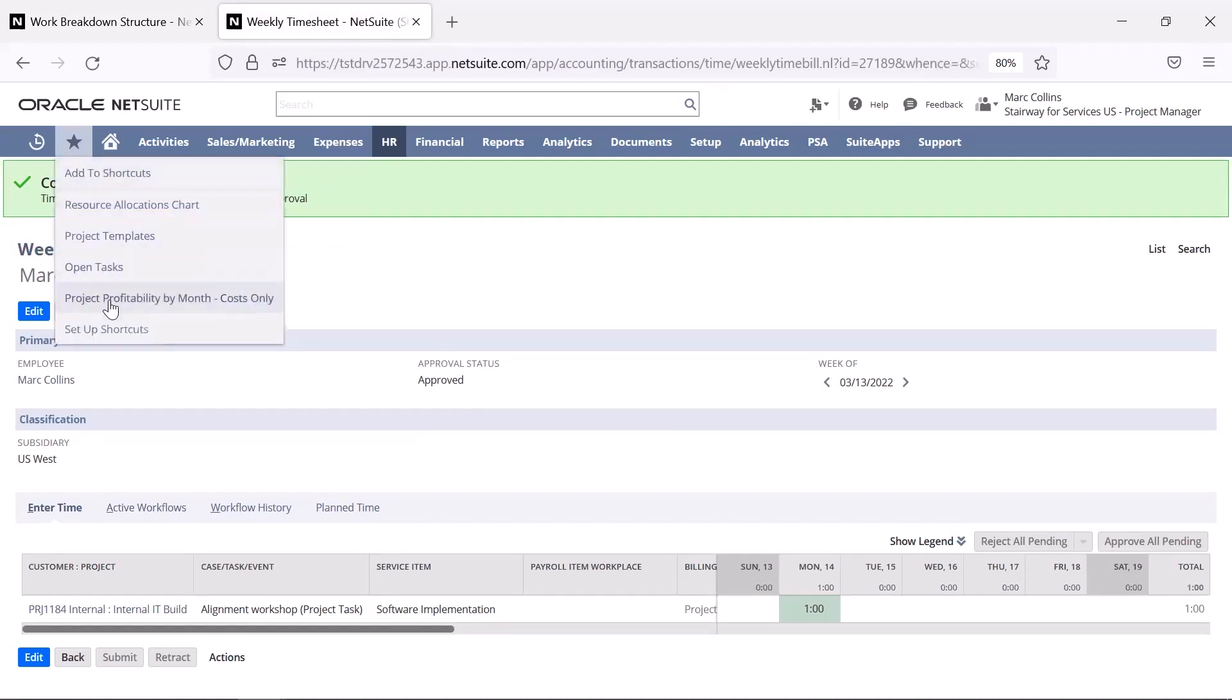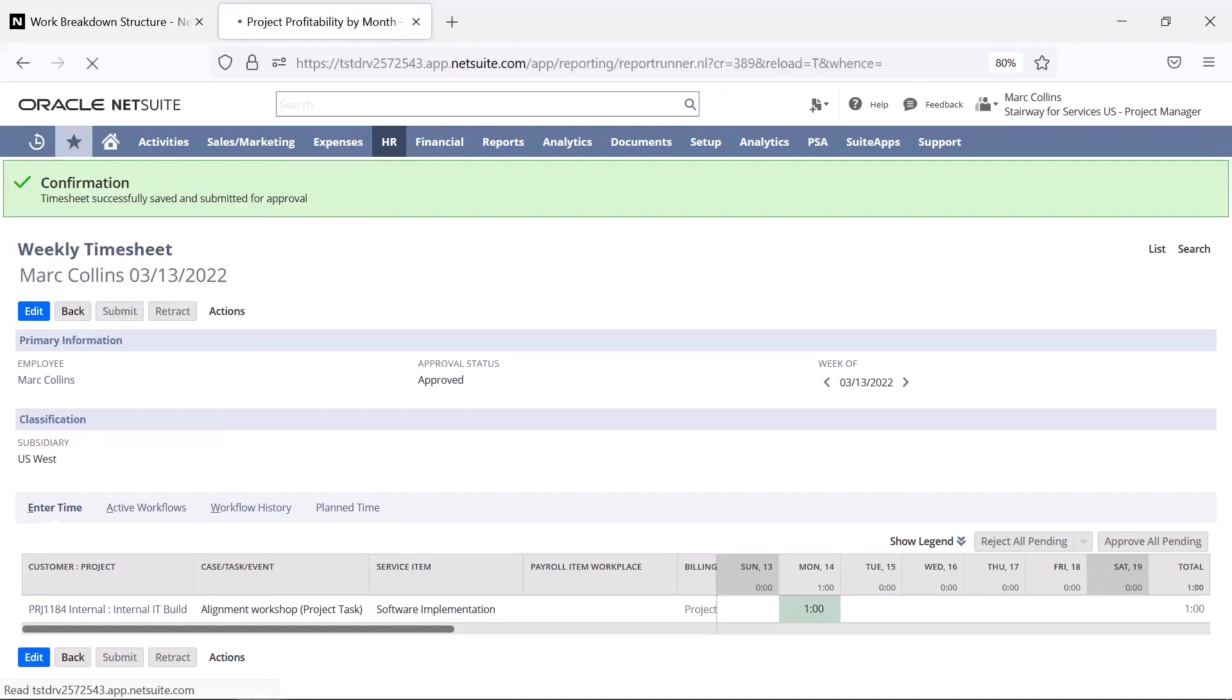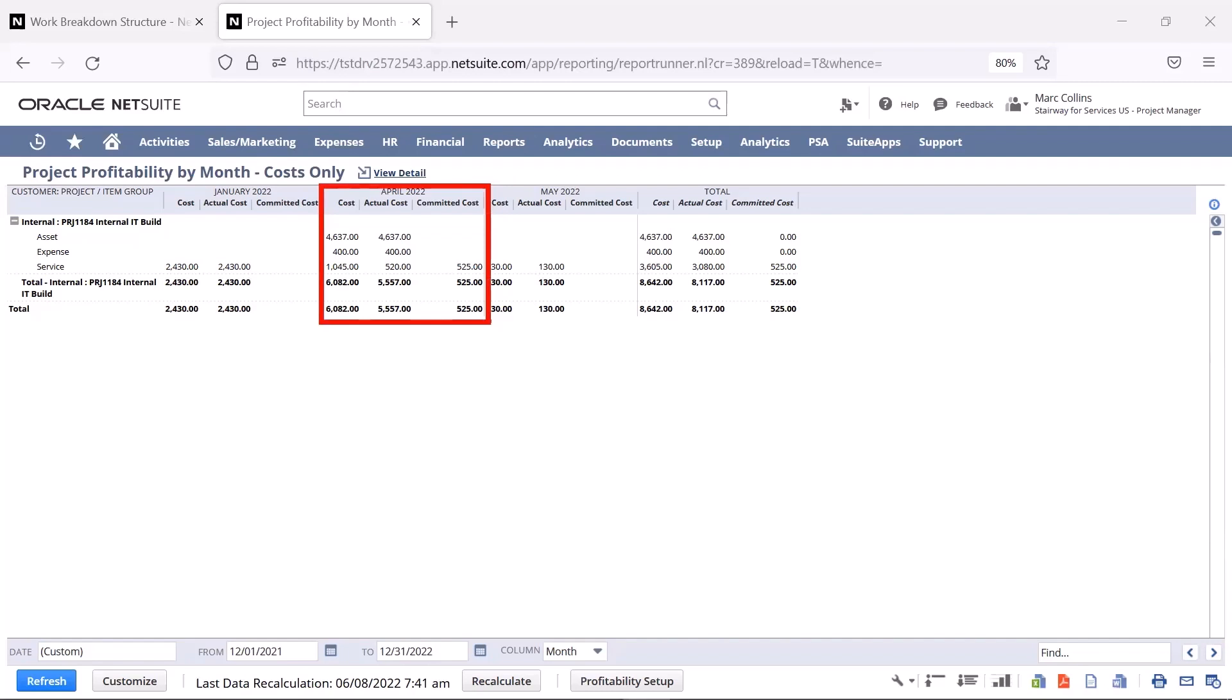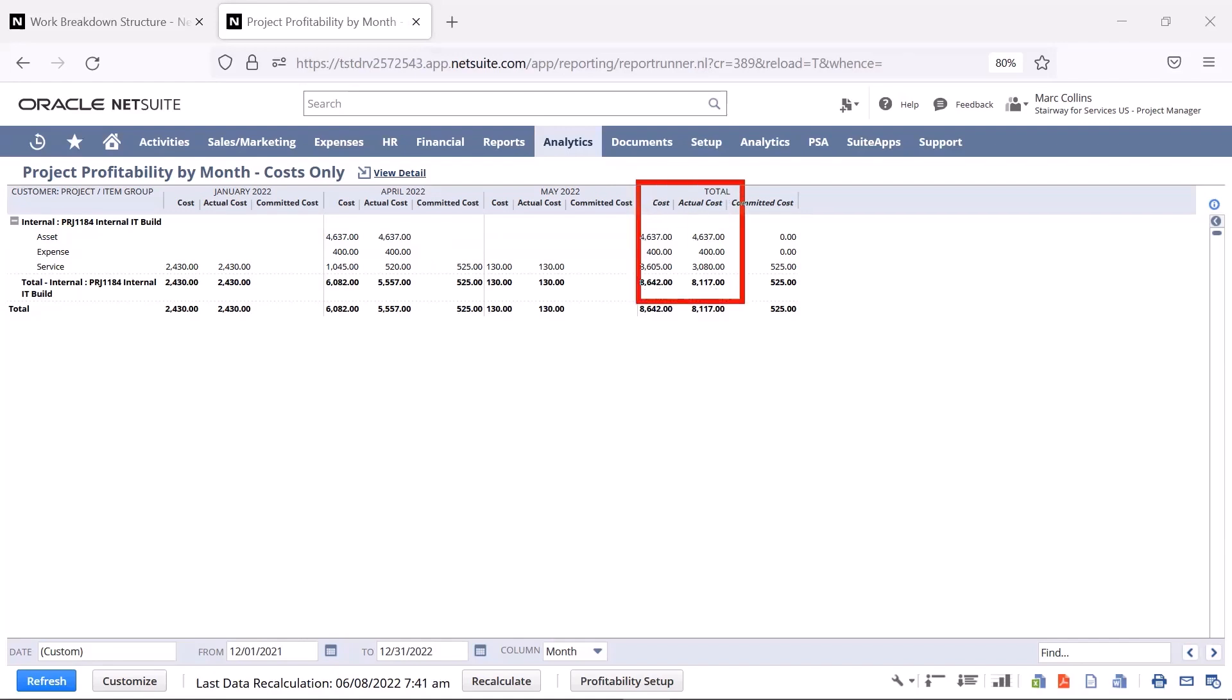This report shows my total costs and actual costs, as well as any committed costs, which are costs tracked in the system but not yet translated to actual costs, like time entries that have yet to be submitted. This provides me with a real-time understanding of all costs associated with my project.